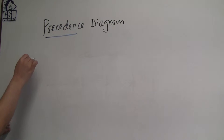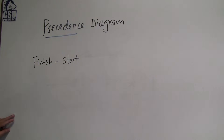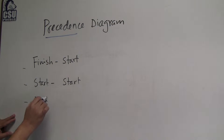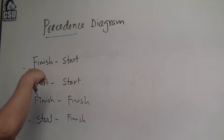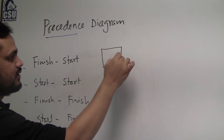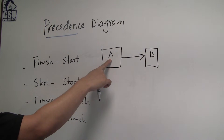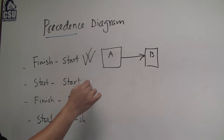So what can the precedence diagram do? It can handle the finish-to-start relationship, just like the node diagram, where one activity finishes and the other starts. Activity A, activity B — B can start once A finishes. This is similar to the node diagram and is the most commonly used relationship.